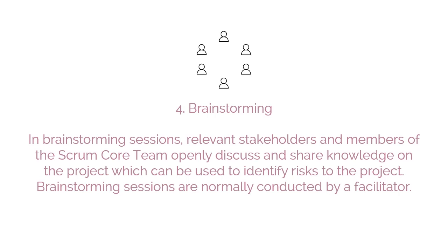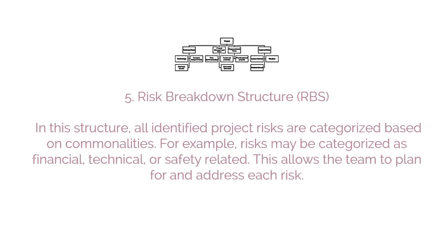4. Brainstorming. In brainstorming sessions, relevant stakeholders and members of the Scrum core team openly discuss and share knowledge on the project, which can be used to identify risks to the project. Brainstorming sessions are normally conducted by a facilitator.